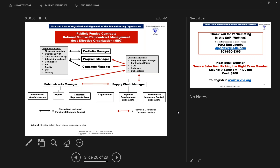We've heard feedback that technical representatives normally report to the program manager — and that's part of the challenge. This must be a coordinated effort. One of the weaknesses program managers have is they don't understand the procurement process. A technical representative is a contract and subcontract management function. We strongly recommend that the technical representative be appointed that responsibility in writing, clearly defining their tasks and that they have no authority whatsoever to modify the contract. The subcontract administrators, buyers, technical representatives, and the subcontract manager work together — the subcontract manager literally facilitates that whole process.